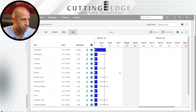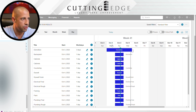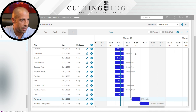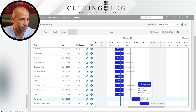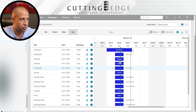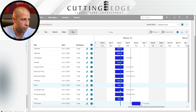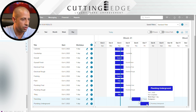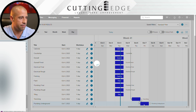Another way of linking without going into the activity is simply dragging from one to the other — it's the same thing but a shortcut. So now I'm telling the story: on Monday, Tuesday, and Wednesday, I'm going to have my demo people working. On Thursday, my next crew comes in and does the trenching — cutting the concrete open. Then the next day, I'll have the plumber doing the underground, which is all the pipes that go underground. After plumbing underground, I need to pour concrete, because the plumber does not do the concrete pouring.